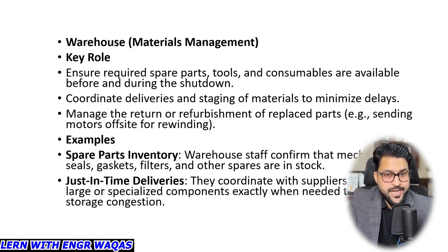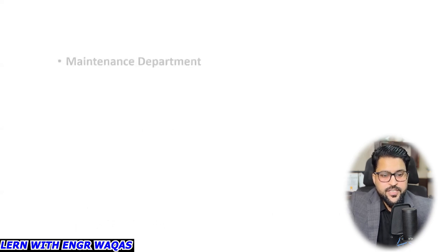Just-in-time deliveries, yes. If I need to replace my valve in the next 15 days, the valve should be there. So they have to make missing items available on time. That is the just-in-time delivery approach. So these are the things these engineers do.